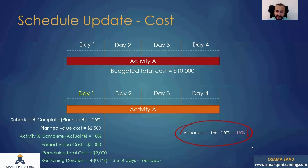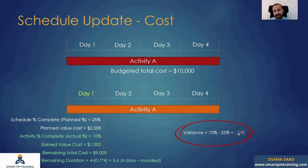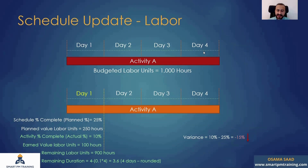The variance here is actual percentage minus planned percentage: 10% minus 25% equals negative 15%. Of course, we know it's in delay — I did only 10% while I was supposed to have 25%, so the variance is negative 15%.